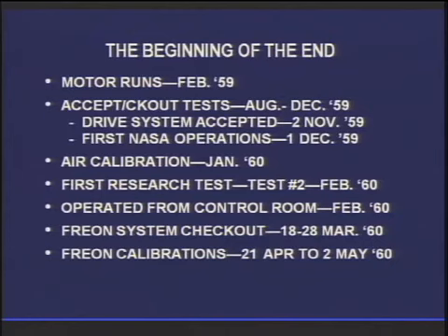But NASA, we're back to NASA now, we saw NACA, now it's NASA, said, okay, Pittsburgh Des Moines, we'll accept everything you've done so far. We're not going to let you off the hook for the stuff that needs to be done. But if you'll let us use what you've done so far, we won't hold your feet to the fire as far as when you complete these other tasks, and we won't assess any liquidated damages of $100 a day. A lot of these contractors got assessed liquidated damages of $100 a day because they were behind the established schedule. So for Pittsburgh Des Moines, obviously it's great, why not?